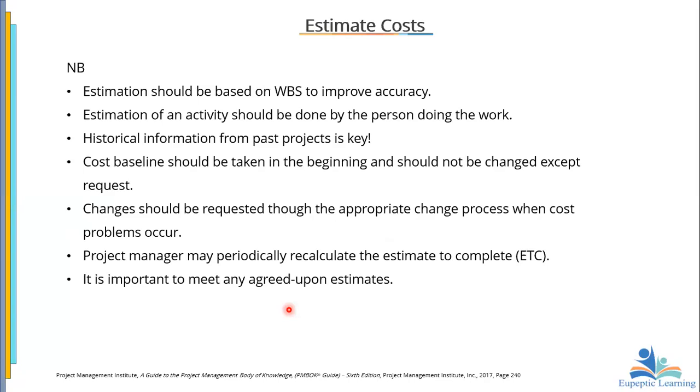If we are estimating, we need to use the WBS. Now, estimation of an activity should be done by the person doing the work. Here, it is very critical to note that because he knows what goes into the work. Historical information from past projects is key.